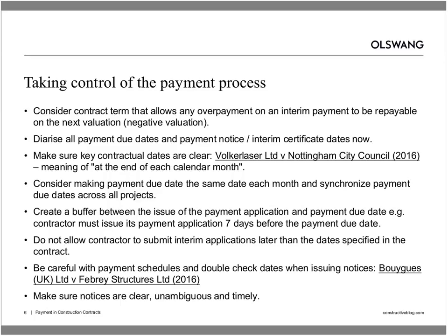And this is the point that falls out of the Leeds case, that if you do consistently let the contractor make late or early payment applications, then effectively you or the contract administrator may effectively be varying the building contract.